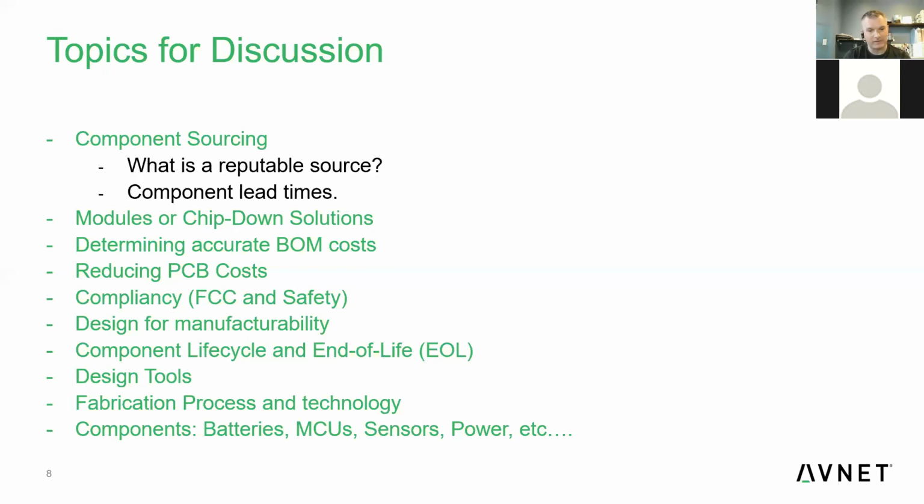So people are kind of just looking at how long it's going to take them to manufacture a product, or how long they think it's going to take to bring a CM on board, and then they figure, oh, 8 weeks after that they'll be good. You need to understand that there are some things that are just beyond your CM's control, and this is one of them.